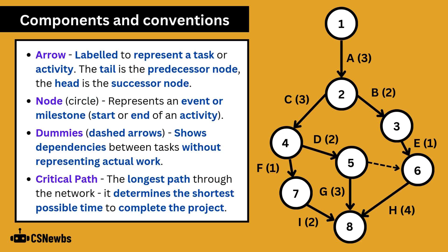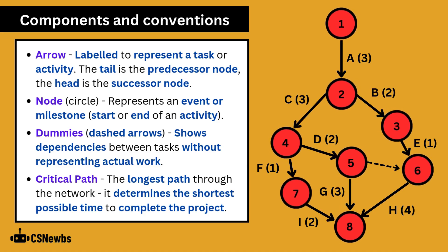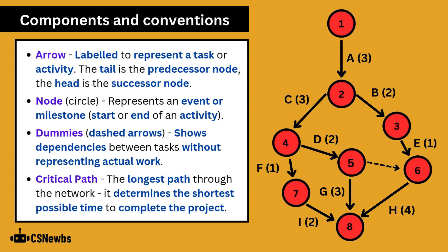The two main components in an arrow diagram are arrows and nodes. Arrows are labelled to represent a task or activity. The tail comes from a predecessor node and it points as its head to the successor node. The node is usually represented by a circle and this is an event or a milestone.